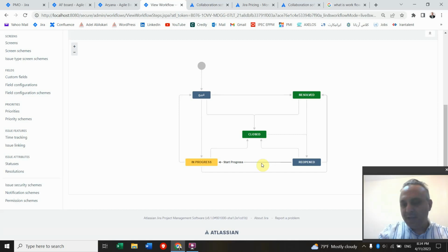For the issue type that is related to the epic of the software, you may have a 3-step or 3-status workflow: open, in progress, and done. Or for the issues that are related to the epic of, for example, back end or front end, that is more complicated and needs checking steps, you may have a workflow that includes 5 statuses, in addition to open and in progress, including the testing and integrating, then closing. You can customize all of them and have all of them in your JIRA.